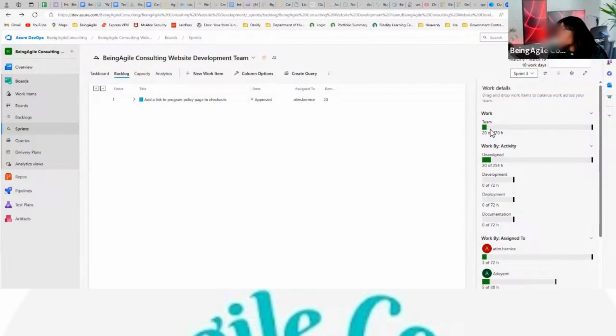okay, in total, we have 470 hours of available capacity as a team. That's our team capacity. Going by the capacity planning we've done, it's giving us the overall data here. We have 470 hours available as a team. We have only committed to 20 hours as a team. So we still have a capacity of this amount of time. So 470 minus 20, it will be 450. So we still have up to 450 hours available, free.